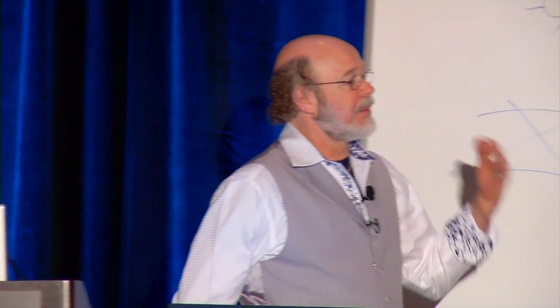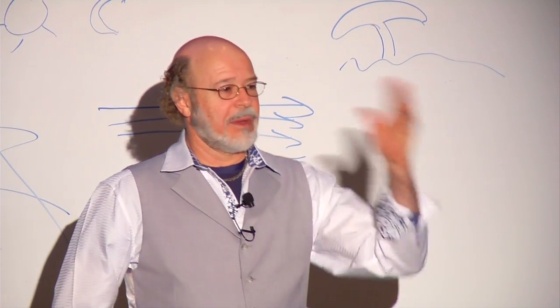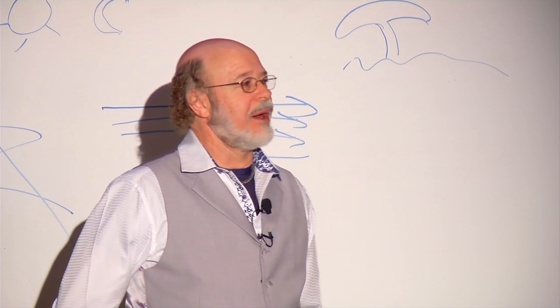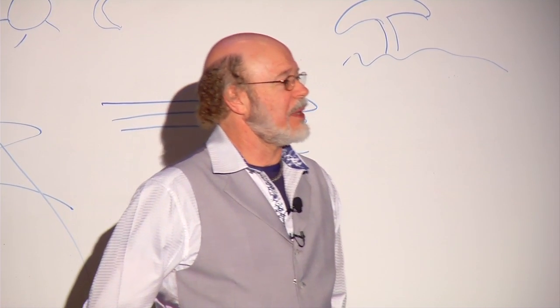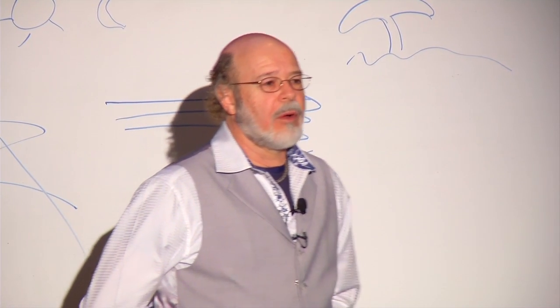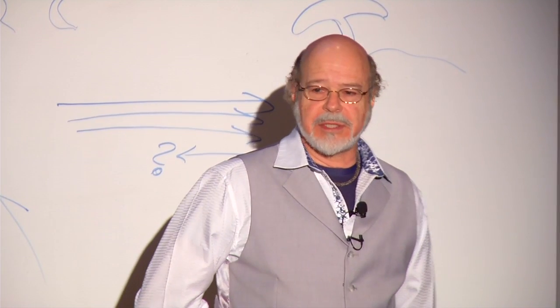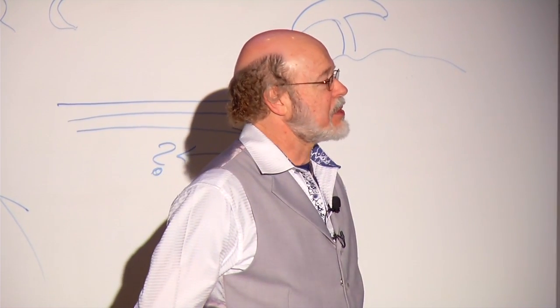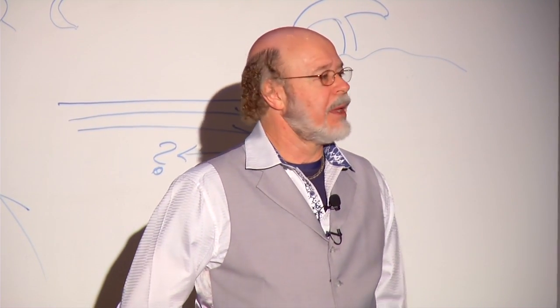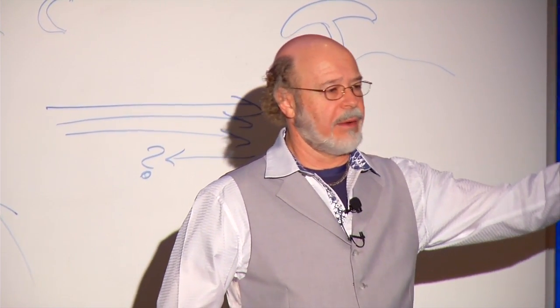We had a university we were doing a project for, and we gave them the review draft, and it was, oh my goodness, we seem to have under-budgeted everything considerably. So the whole process had to go back through design to sort of like resize the building. So some significant things can happen there. So a whole new set of milestones come into play for the final.